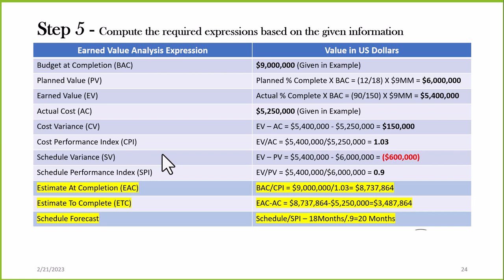So what does that do? We've got some penalties associated with this project, don't we? So if we have penalties associated with this project, and I'm towards the end of the project when I do this, guess what? I'm going to be paying money out. I'm giving away my profit because I did not measure to see when I would be finished with this project. This is what we call leading indicators. Leading indicator says that I will check the amount of money that I'm spending, my schedule performance, periodically.